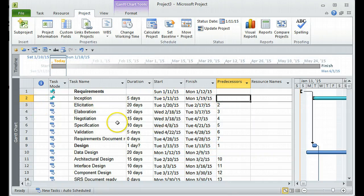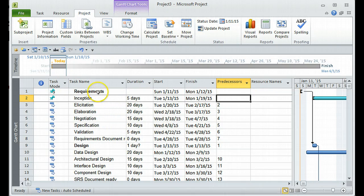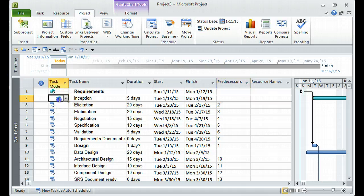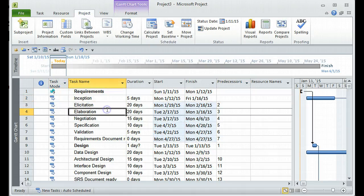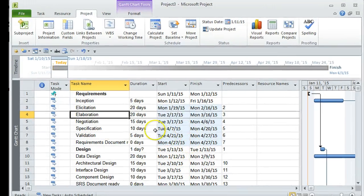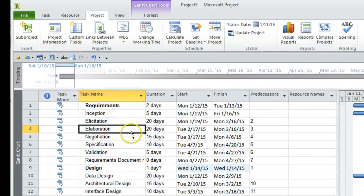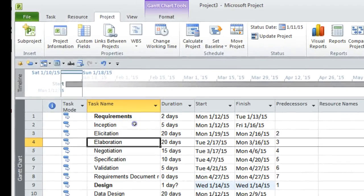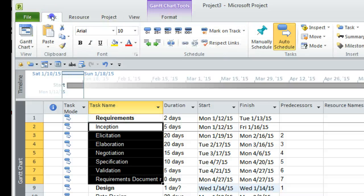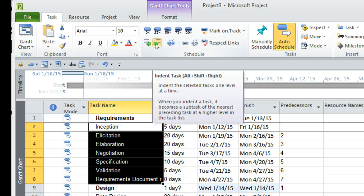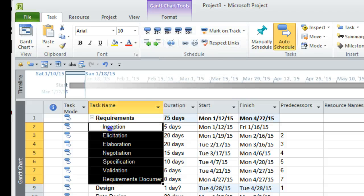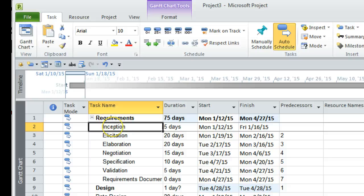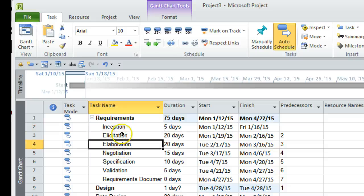We now have all the data needed for the rest of the tutorials. You'll notice that most of the tasks are not indented. I'll switch this back to auto schedule for the project. To quickly indent tasks, select the tasks, go to the Task tab, and click the right indent button. This indents all the selected tasks so that under Requirements you now have all those tasks as subtasks.